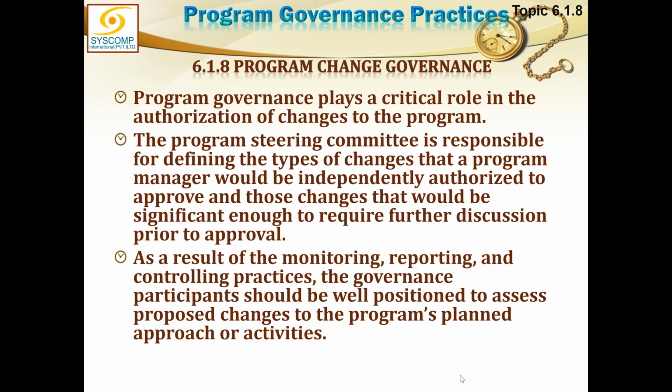Because whatever the project level control board is concerned, project board or change control board, program manager is involved with that. So that level of changes, he can deal directly. But if there is some change which is affecting the overall program, probably such a change will have to go to the steering committee.